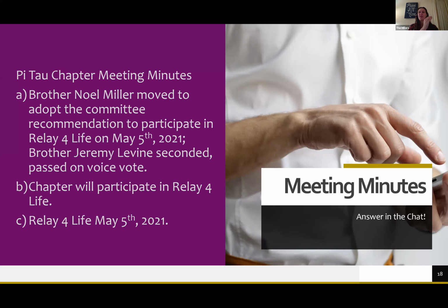I make sure that I have here's who brought up the idea, here's the idea that went through, the team signed off on it, right? I want to know who signed off on things, because if I get the question of who agreed to that change, I want to be able to go back and say, well, Ashley, the business owner, agreed to that change, right? Or Adam, the IT lead, agreed to that change. And so documenting things at that level is a good exercise to get into.